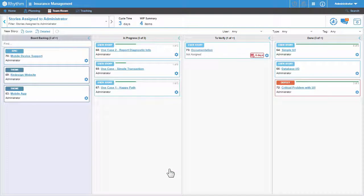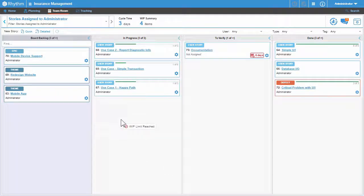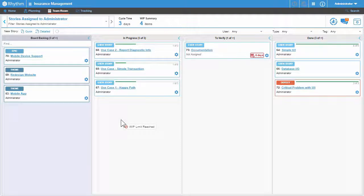And now notice that when I try to move a 4th story into the in progress lane, I receive a work in progress limit message notifying me that I can't move any more stories into the in progress lane until I've moved some of the existing stories out of that lane.